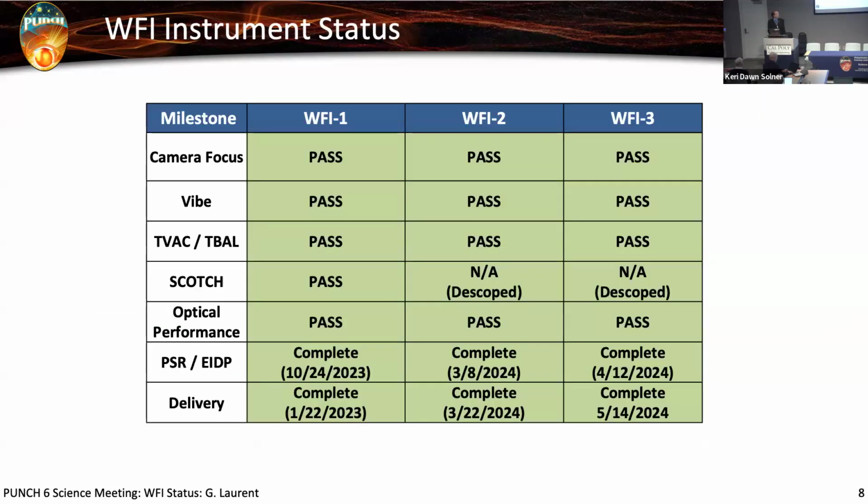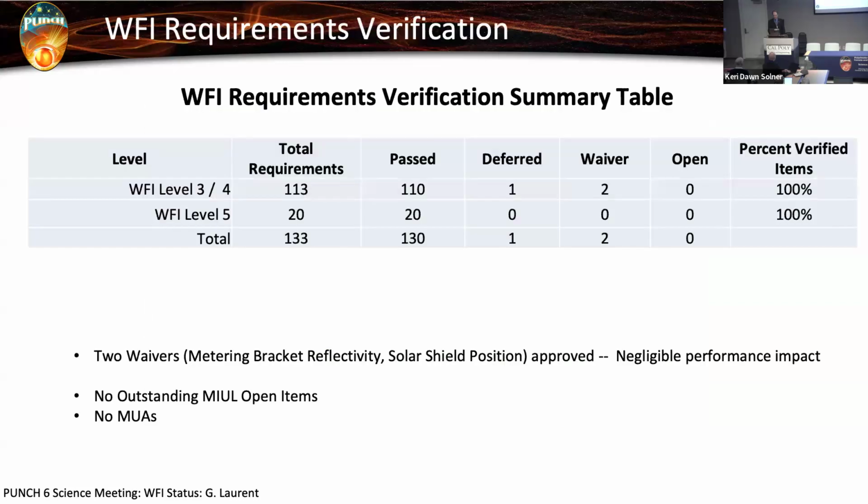All 3 WFIs went through intense rounds of comprehensive performance testing, including camera focus at multiple levels during I&T, environmental testing with vibe and TVAC and T-balance. The WFI 1 instrument was brought to NRL for stray light testing at the Scotch facility in order to validate the stray light design. All 3 instruments were delivered last year, and additional optical testing and functional testing was performed at the observatory level as well, which I'll get into.